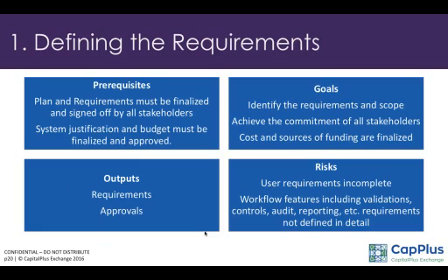The second thing that I want to cover is the workflow features. They have to be defined in detail. As I said, I told you about the RFP with 50 pages, right? So if you define detailed workflow, it will be 50 pages at least. And the workflow should include validations, controls, audit, reporting. When I say reporting, you need to even draw the report the way you want it, including subtotals and grand totals,